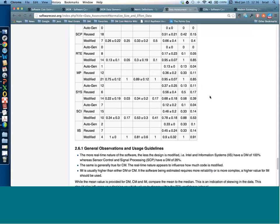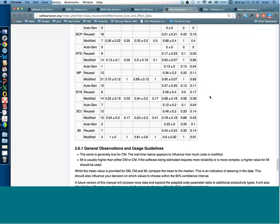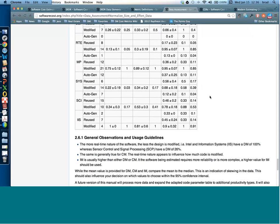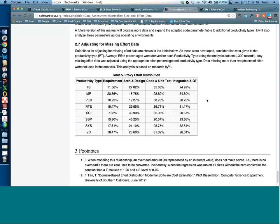For missing effort data, if it's apparent that an activity was not done, we wouldn't fill it in. But if you have to fill in missing percentages, there's a table of percentages. This table can also be used as an effort distribution table for distributing CER results across different development activities.